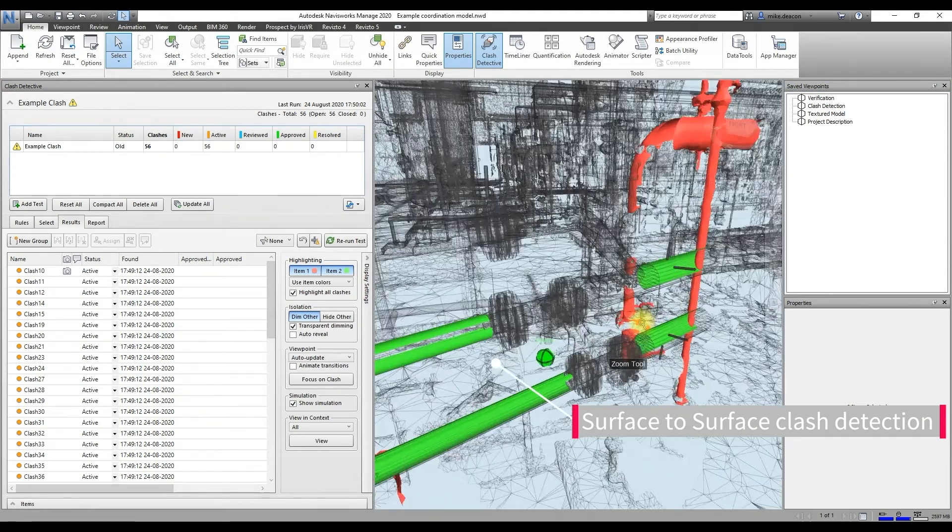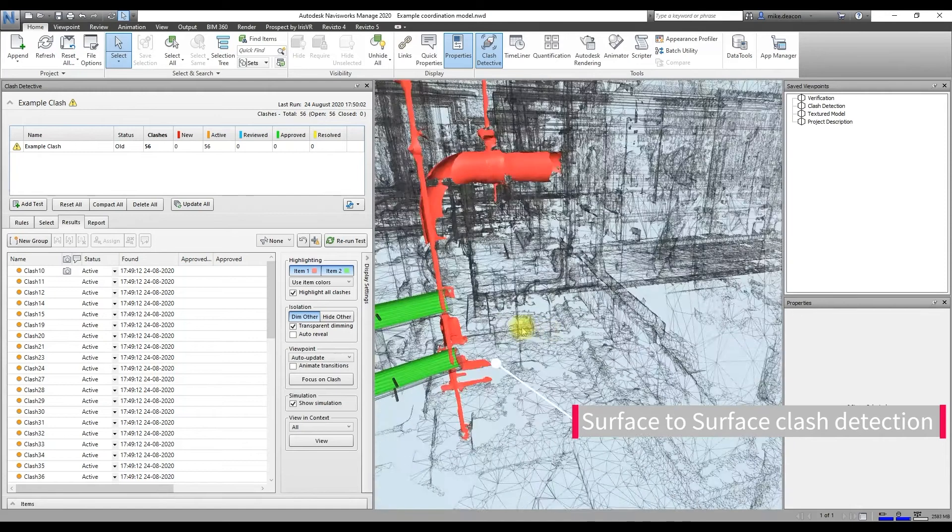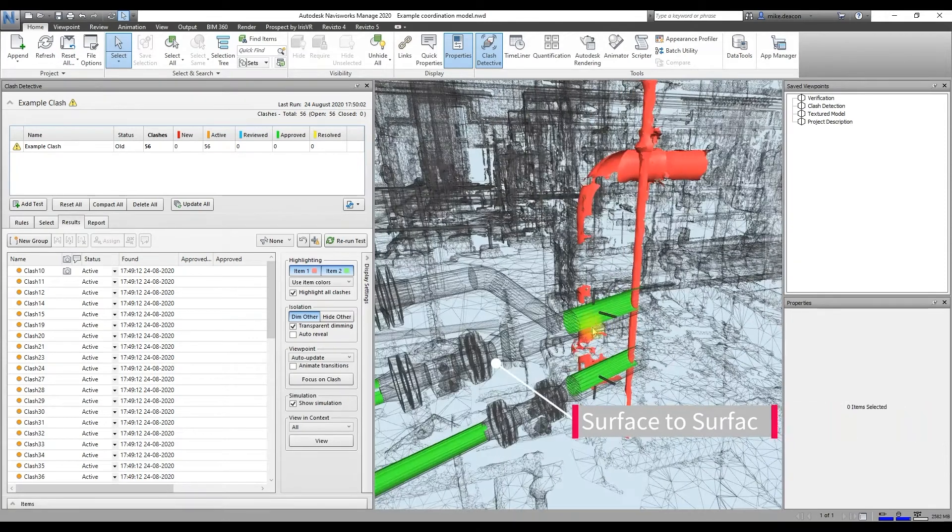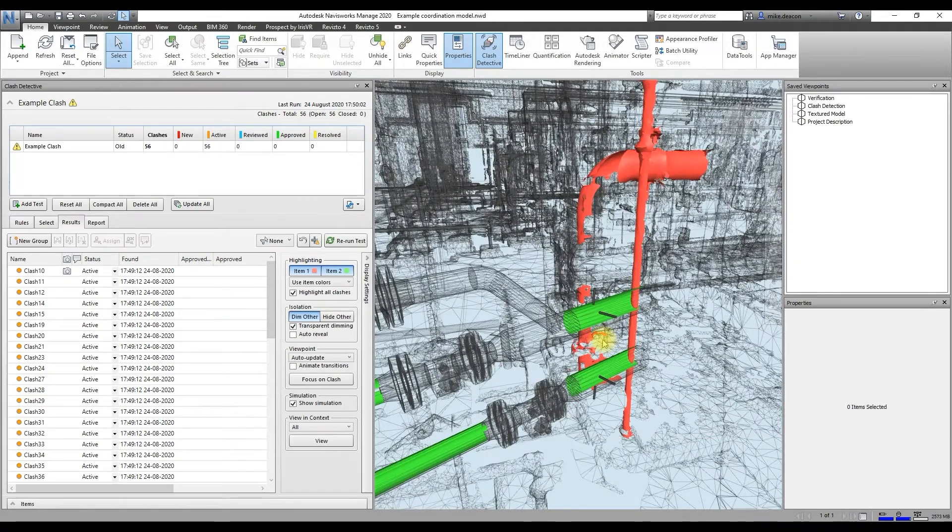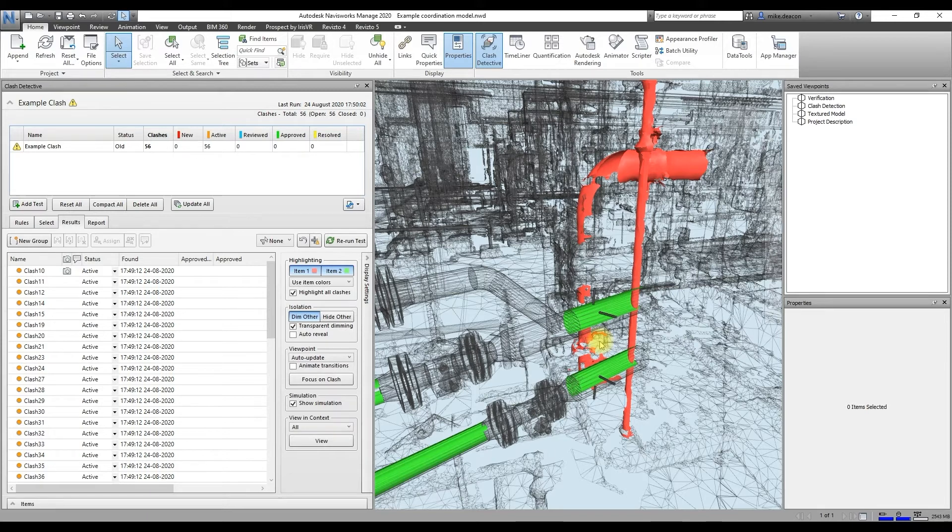And if we zoom into this mock-up clash that I've created, you can see it's actually performing a surface-to-surface clash rather than clashing the entire mesh model as one piece. So here, as you can see, there's less false positives and false negatives, and the information is being delivered in a way that's quite familiar for a BIM coordinator. So that's really going to enhance those coordination workflows.